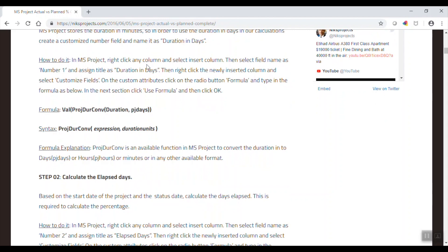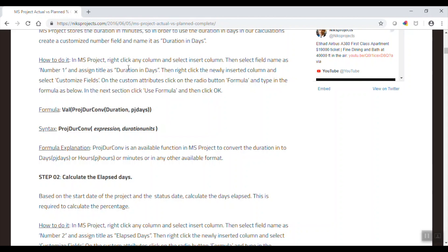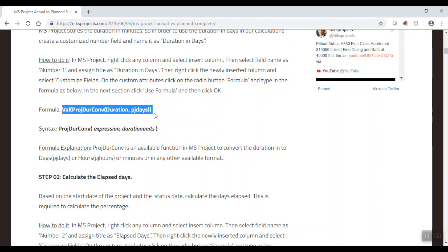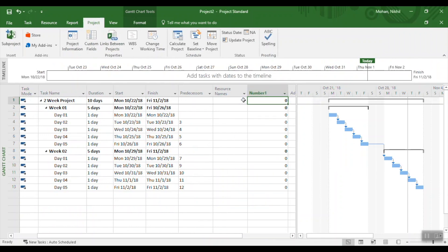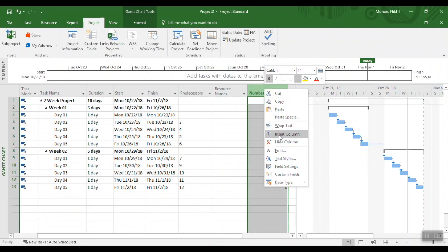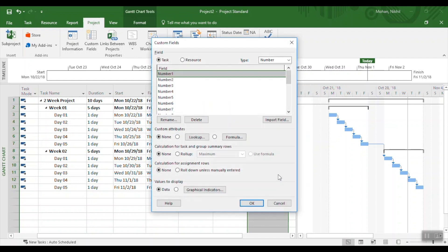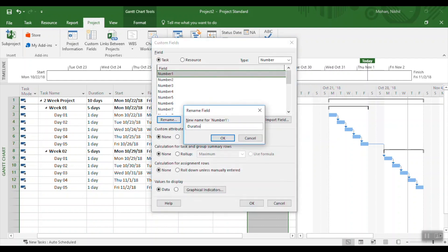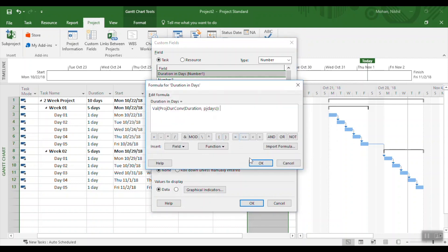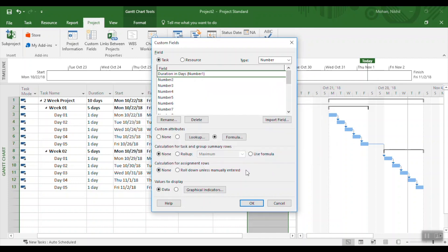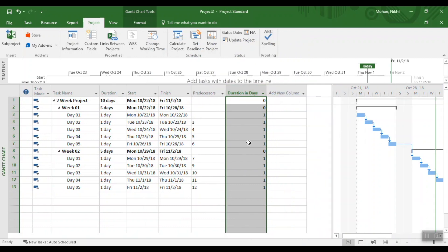To do Step 1, you need to create a new column with the Number format and call it 'Duration in Days.' Copy the formula from the website, then in MS Project right-click and insert a new Number column. Go to Custom Fields, rename it as 'Duration in Days,' click the Formula radio button, paste the formula, and click OK. Step 1 is complete.